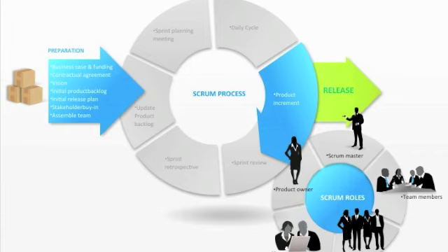The when. Every 2 to 4 weeks is when there is an expected deliverable. This time frame is in place within Scrum and other methodologies to ensure teams are going down the right path. It allows for course correction quickly in case a deliverable does not meet the business need or the team may be moving in a direction that is not within scope. The where. Anywhere in the world there is a project to be completed. The how. By following the methodology's strengths and implementing it effectively.